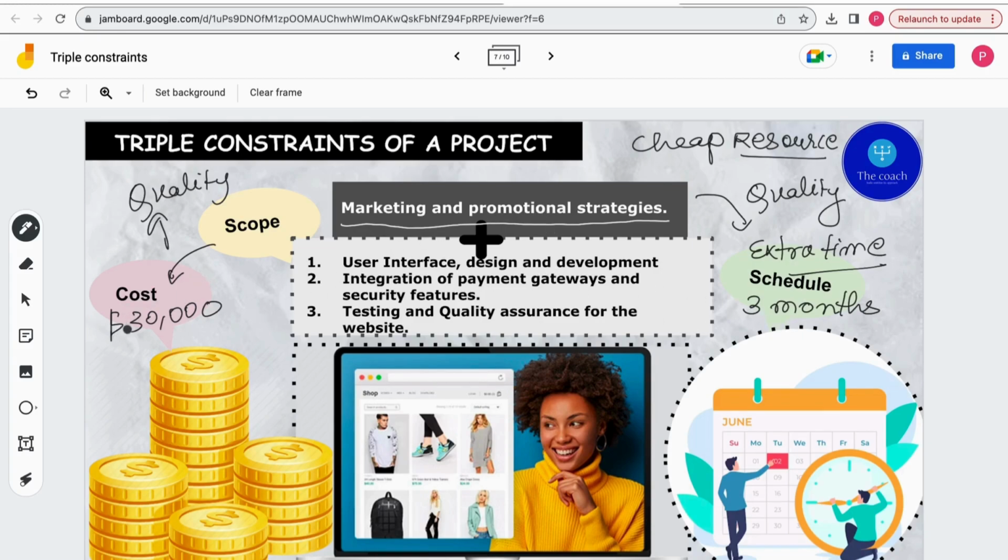That means you can ask that instead of $30,000, let us make the new cost $40,000, 10,000 extra for marketing and promotional strategies. And I will say to my customer that since you have added the scope, I want to make the schedule 4 months. So now you get extra time and extra cost for your extra scope, and things can run smoothly.